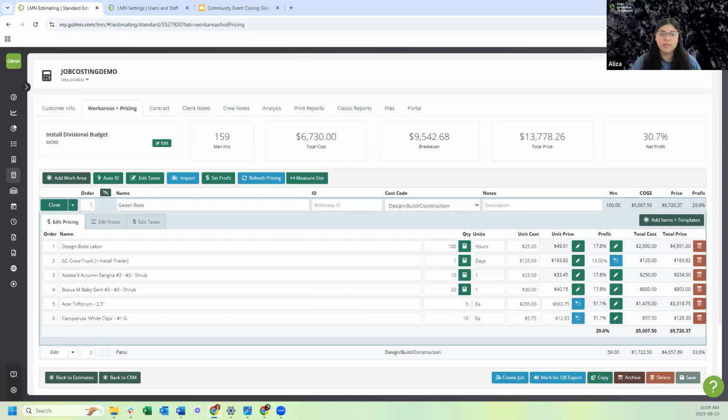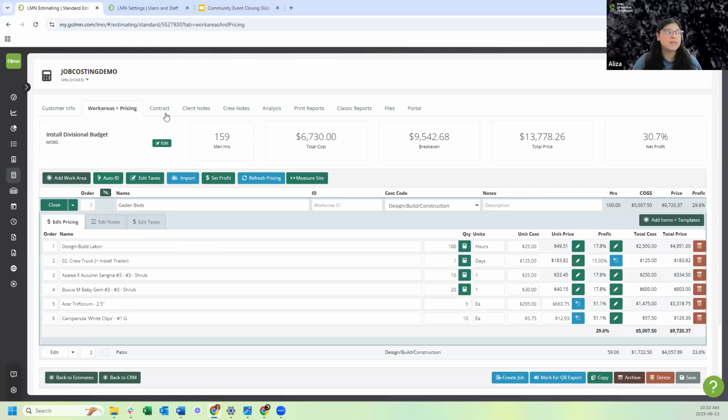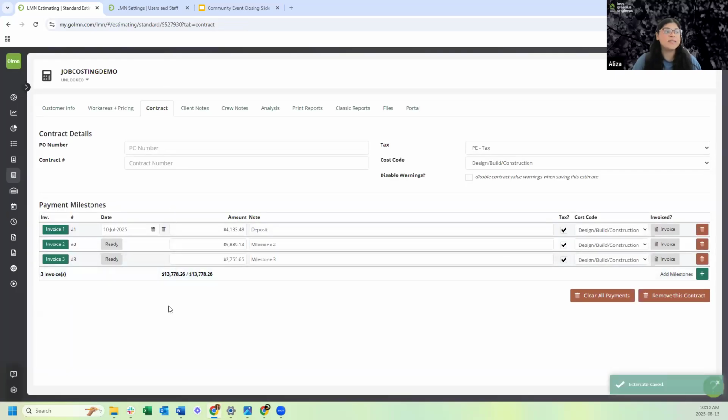Another really important prompt that you must gauge is a contract. When you create any job or any estimate for a standard job, you set up a contract in the actual estimate, right? This is milestone-based billing or contract-based billing. All standard jobs are invoiced this way. We're not going to get too much into invoicing, but I just want to show you that for all of your milestone type jobs, there's an invoice setting or an invoice contract in place.